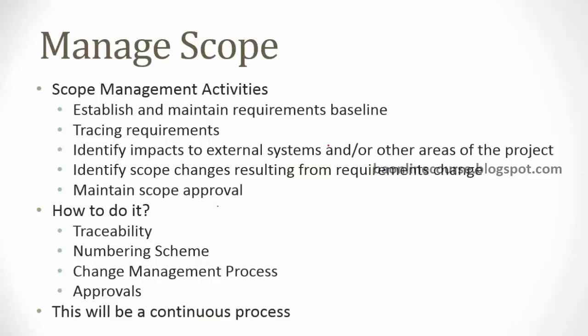Okay. So if I have to clearly summarize what managing scope or requirements is, I would say, what? If I have 10 things that I have agreed initially, right? So 10 features I have agreed in the system. Okay. I'll make sure that all those 10 features are delivered. So that's one part of the scope management. Okay. All 10 which are agreed upon have to be delivered in your final system. Second thing, you'll not pick up anything more than that.